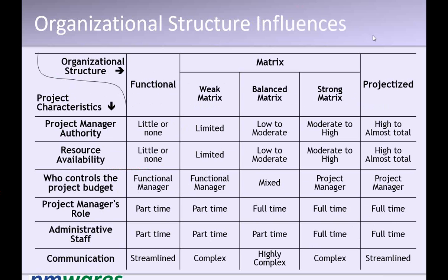Therefore in the same project, the project manager has a stake, and the functional manager also has a stake. The number of stakeholders increases, and therefore the communication becomes complex. It becomes a matrix organization. We normally call it a matrix organization where every project has a project management stream and a functional management stream. The functional manager and project manager both have their takeaways from the same project.